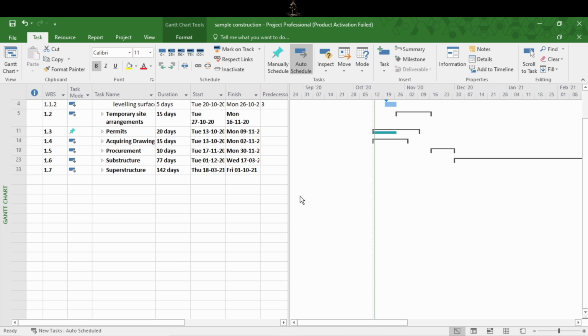Now you will get a question: at what level should we stop breaking down these activities? That means in what depth, in what details, can we add activities? The answer is we should break down activities to the extent that they cannot be broken down further logically, or managing them would be very difficult in too much detail. Also, when determining the cost of an entire summary or work package, it will be difficult to calculate because of small and complex things involved in actually doing the activities.